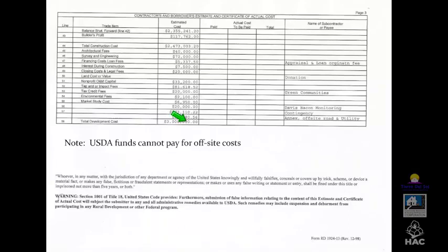Allow plenty of time for contractors to respond, usually 30 to 45 days, and here's my personal experience with this one. If you shorten that much, you might likely cut down on who's going to respond, and they miss items in the bid because they did it so quickly.